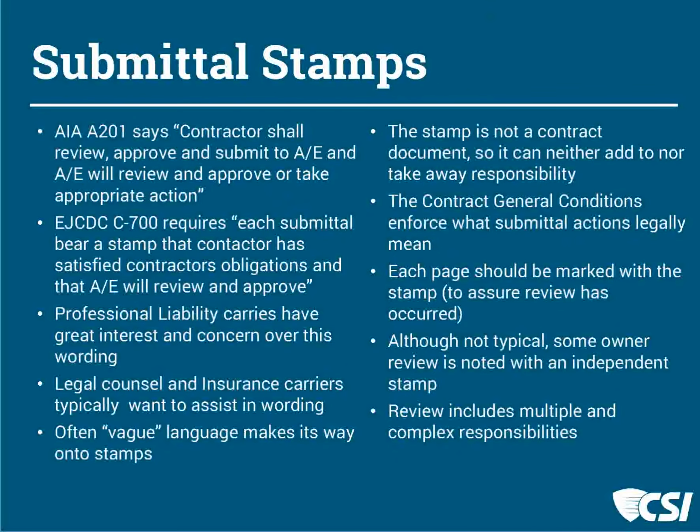Absolutely. That's the kind of stuff that I love as a product of these webinars, so thank you for pointing that out. I'll look. The old one said the contractor shall review, approve, and submit, and we will take action on that. But it doesn't say there that they'll stamp it. EJCDC says one thing, which is almost the same, but it does say it will bear a stamp.